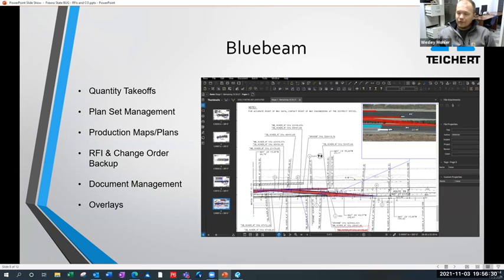These maps are very important to foremen as tools to plan their production. Okay, if we can get 800 tons of asphalt tonight, how far does that take us, to what station mark or what location? With that 800 tons, where do we have to get to meet our goal and make money on each day's or each shift's work? So those production maps and plans are really important. I know they have similar things on the commercial side, but that's big for us.